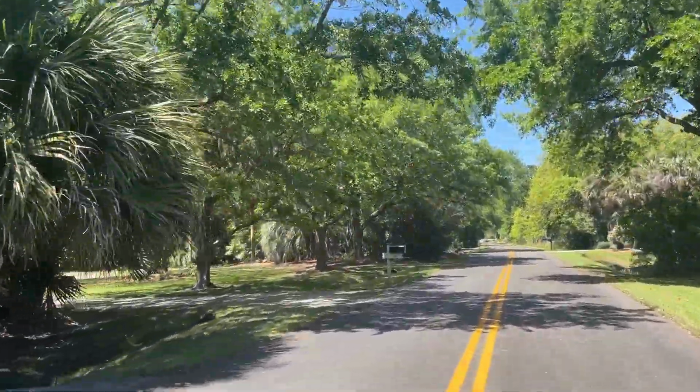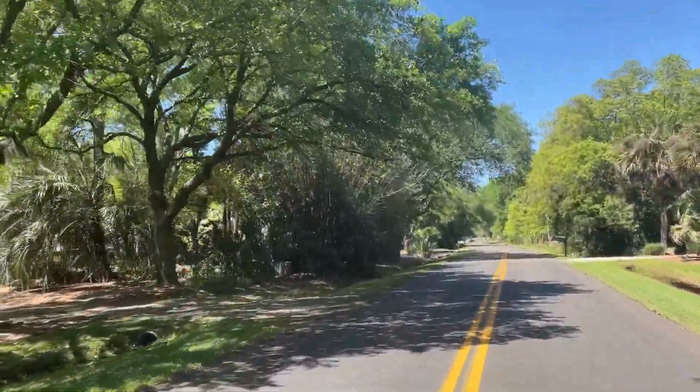What criteria would you guys use to select the roads for this kind of program? Yeah, so we are working on a pavement preservation program. Every 3 to 4 years, the county gets with a consultant, and they collect data on every road in the county. They bring their equipment in, go out and ride every road and record the distress data and any information that goes with the road. Then they look at that distress data, come up with a rating, and use generally a traffic volume and a few other criteria to come up with a prioritization, and we use that to develop a 5-year plan, which forms the basis of our pavement program.